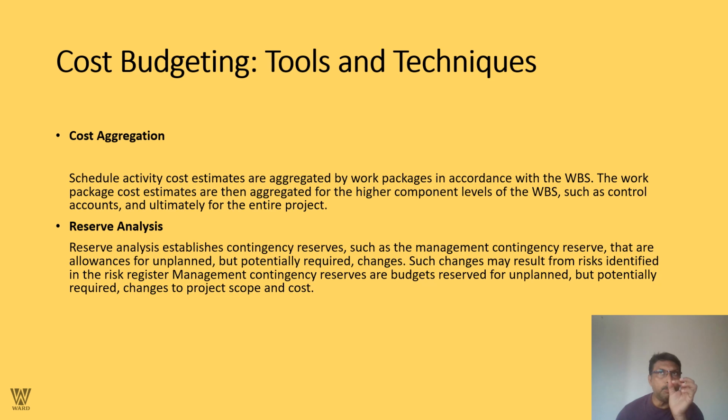Thereby, we're talking about cost aggregation. Schedule activities cost estimates are aggregated by work packages in accordance with the work breakdown structure. The work package cost estimates are then aggregated for higher component levels of the work breakdown structure, such as control accounts, and ultimately for the entire project.